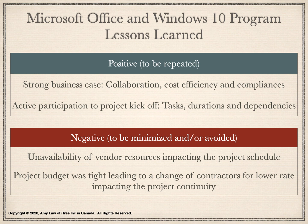Last but not least, the project ensures security compliancy through regular security patches and information compliancy through retention schedule in document management. Key stakeholders played an active participation during the project kickoff. The session had over 30 people, including project sponsor, project manager, business analyst, technical analyst, support desk managers, operating managers, and change manager. In the kickoff session, we were able to identify project tasks, durations, and dependencies.